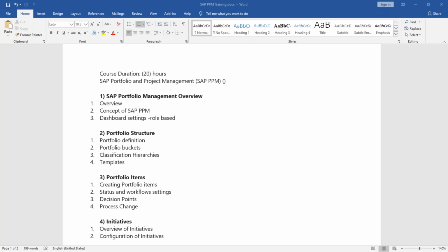You have an allocated budget, you have planned cost, you have entered everything, and actual cost will come from the project. So in item, in capacity planning, the efforts and whatever you are entering, that is your planned efforts. It will not be linked to any work center or anything, any FI entity.